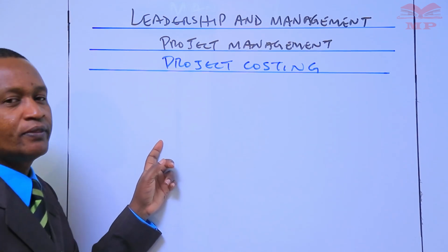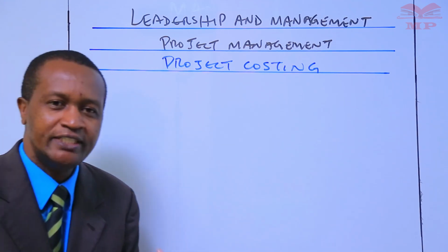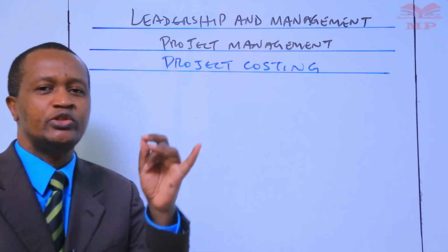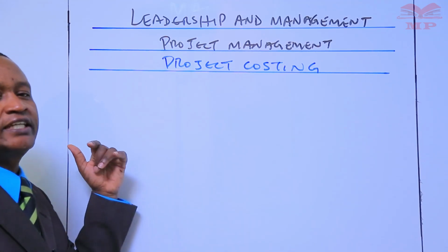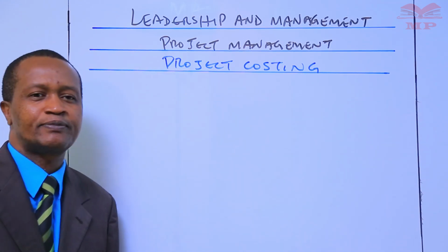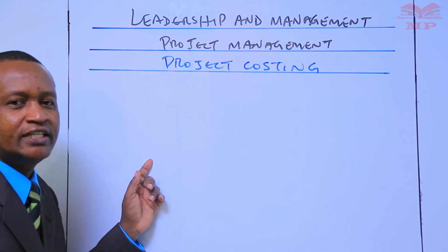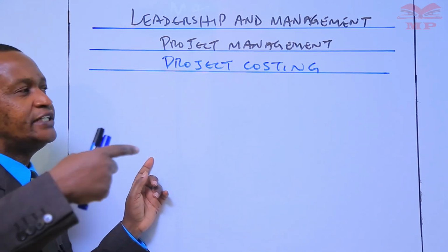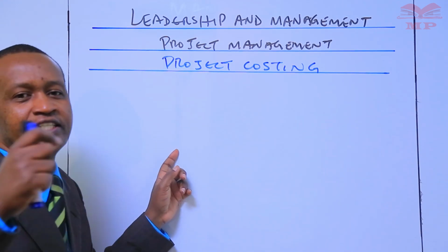For example, candidates, limiting the number of design reviews can reduce the cost of the project but could increase the resulting product's operating costs. And another aspect of cost management, candidates, is recognizing that different stakeholders measure project costs in different ways and also at different times.